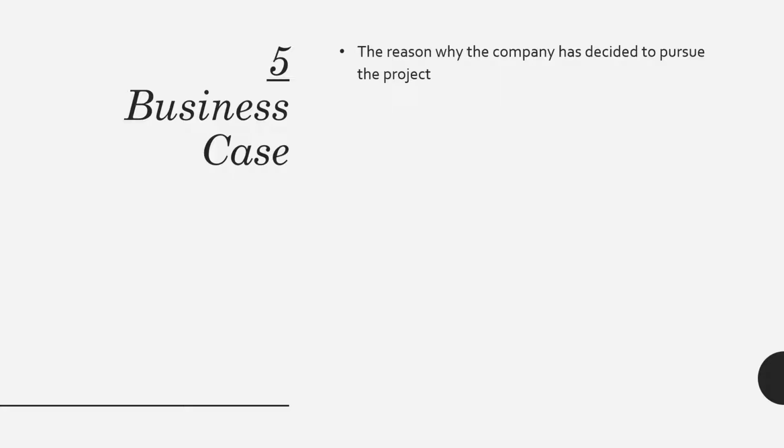The intent of the project charter is that throughout the course of the project, if something changes, if the requirements change, if you are going to be painting the walls, the internal walls of the building from, let's say, gray to white, your project management plan might change, but your project charter essentially remains the same.